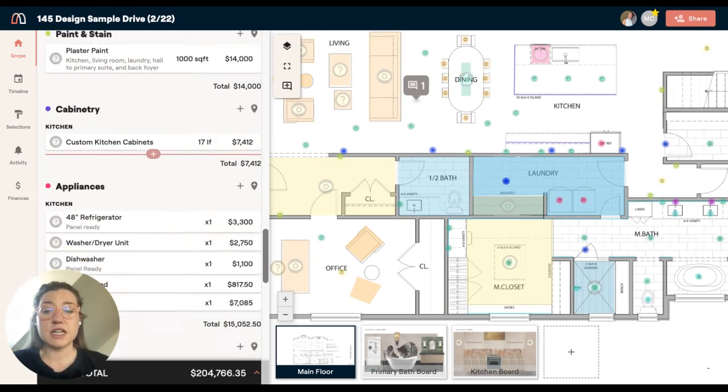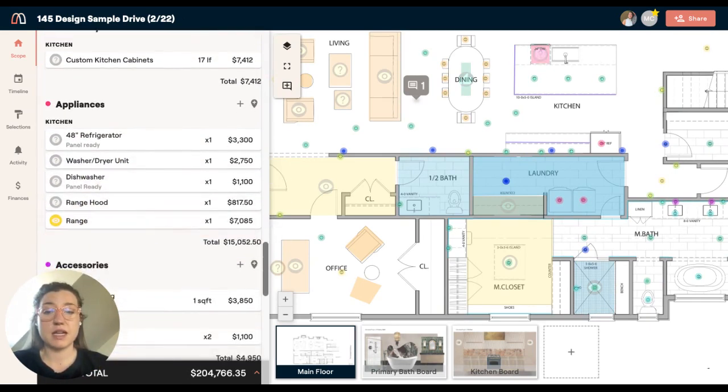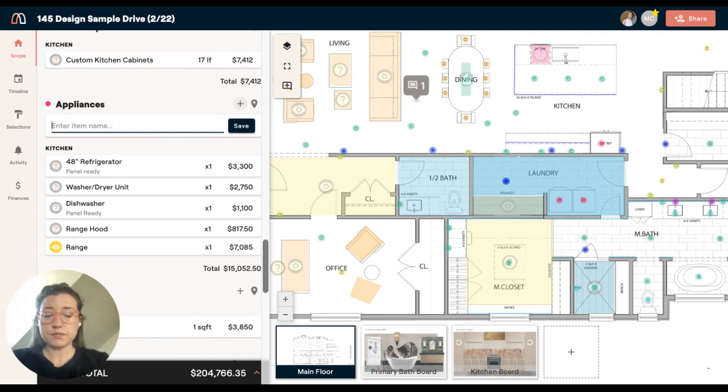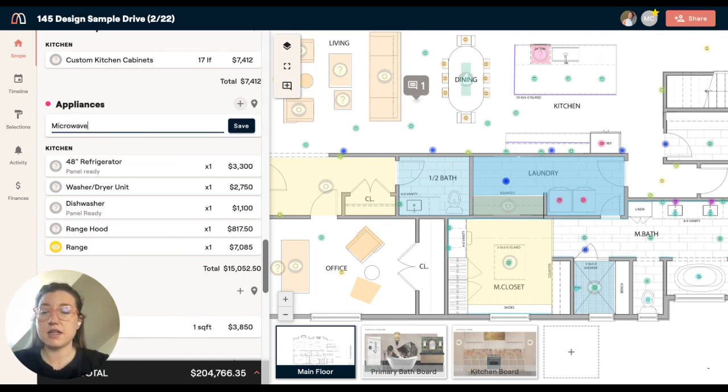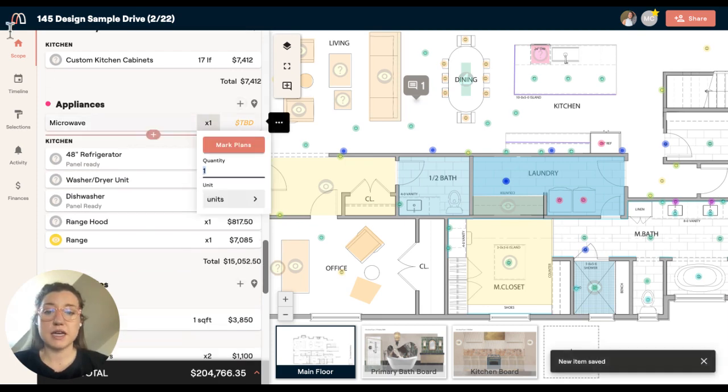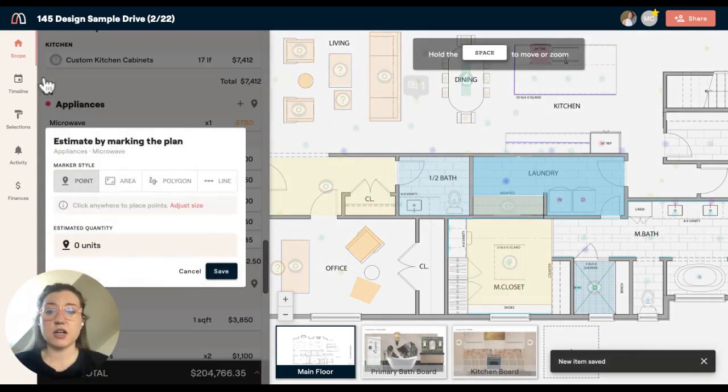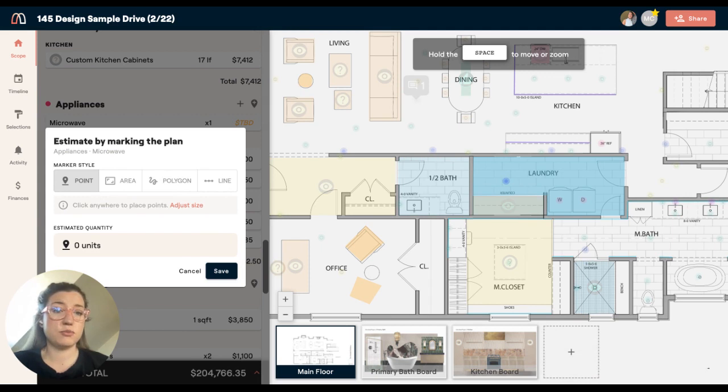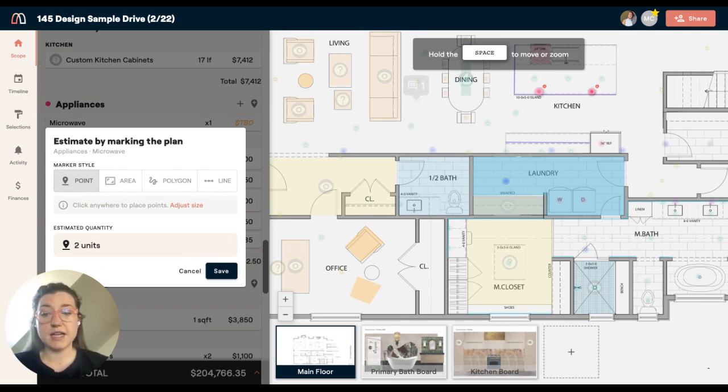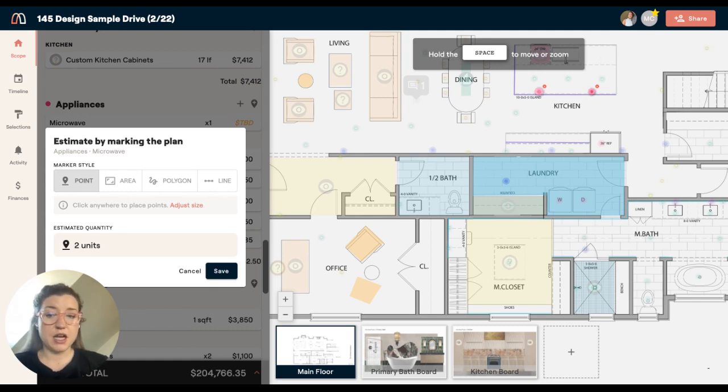Materio is actually going to help you estimate the quantities on that. Let's say I'm adding an appliance here, microwave, and I want to mark the plan so that I know our client wants two microwaves. I can go and mark the plan. When I do that, Materio is going to estimate that quantity for me.